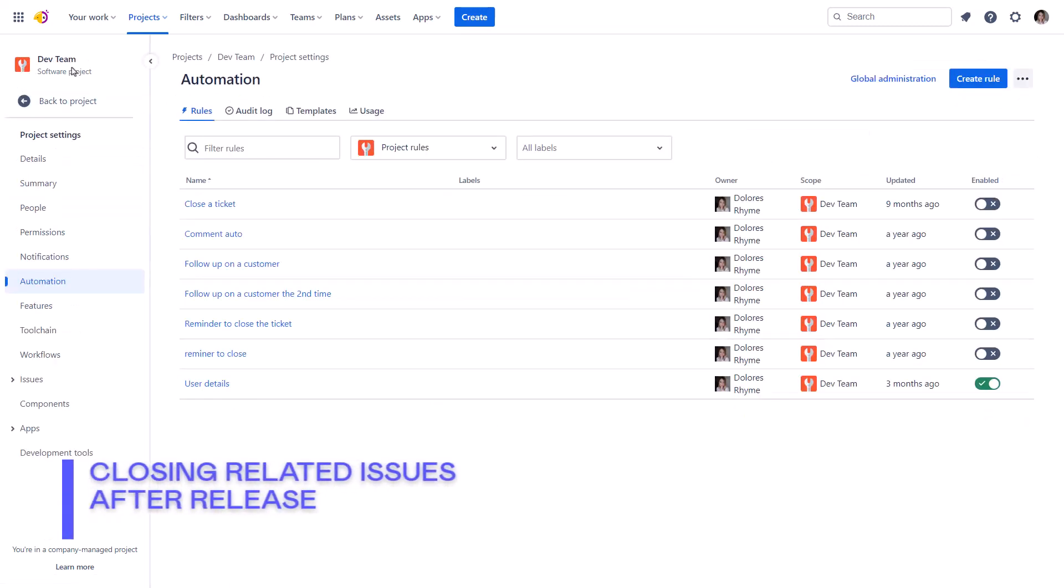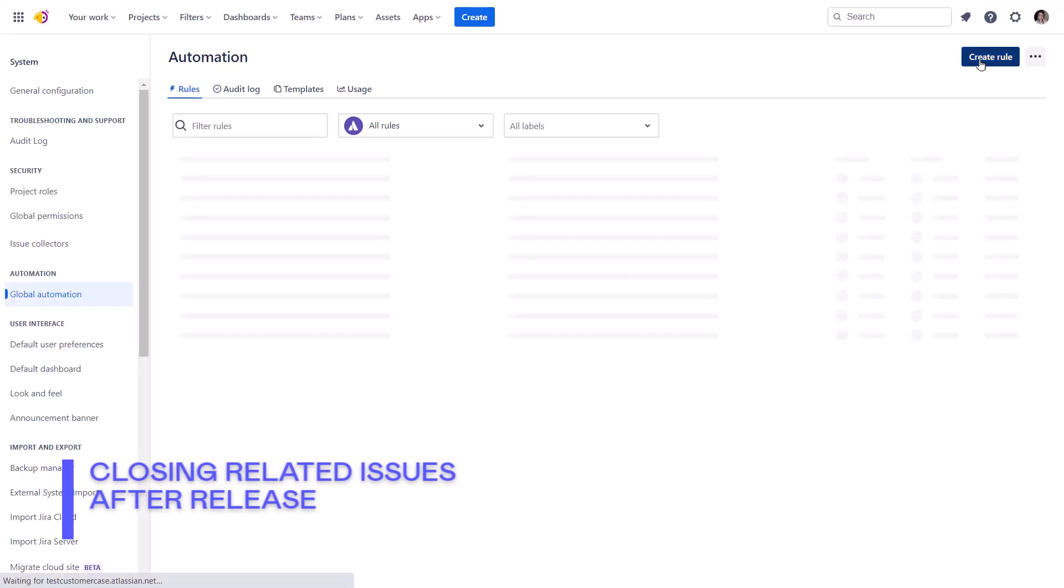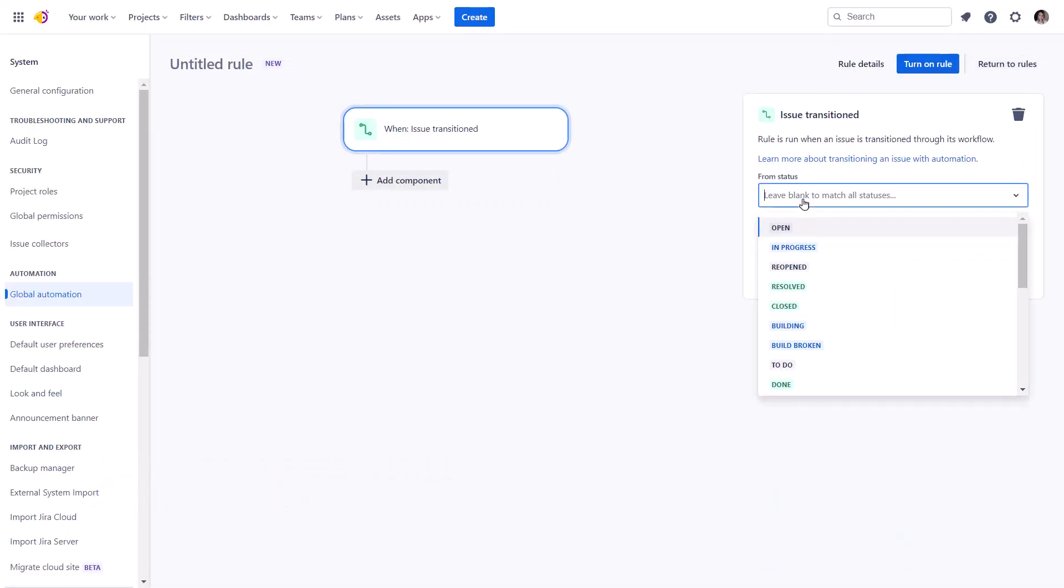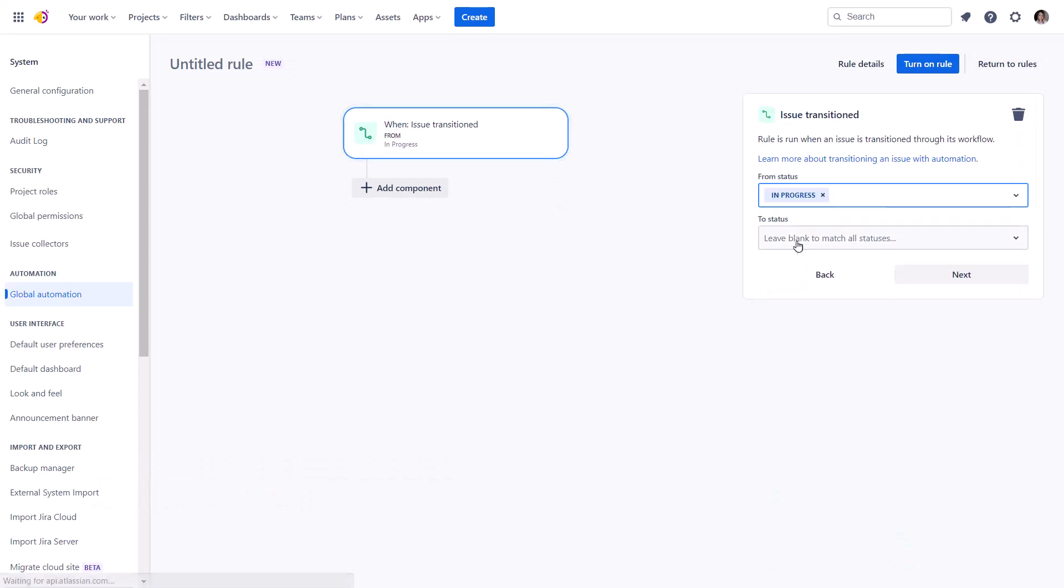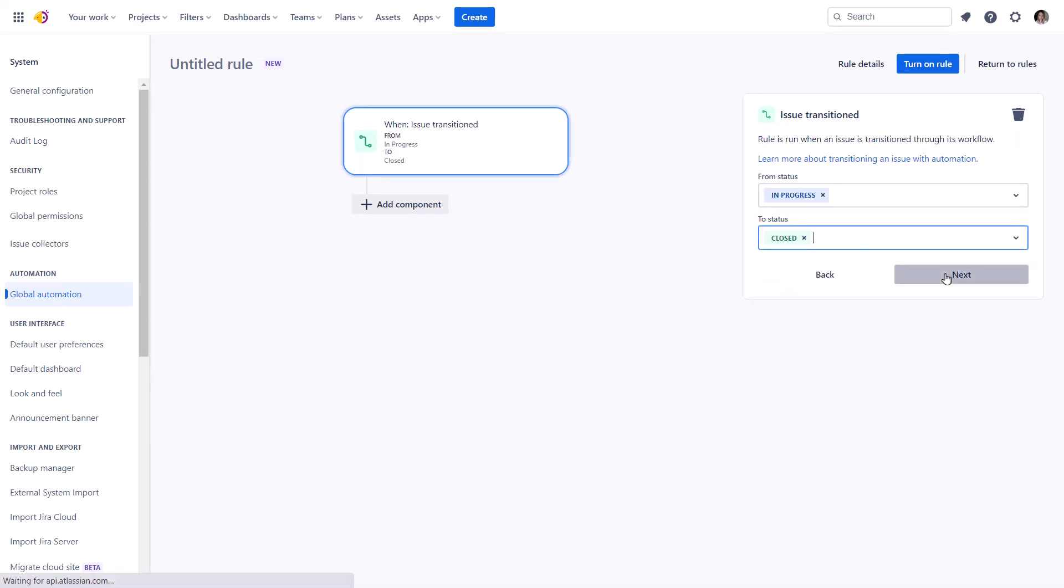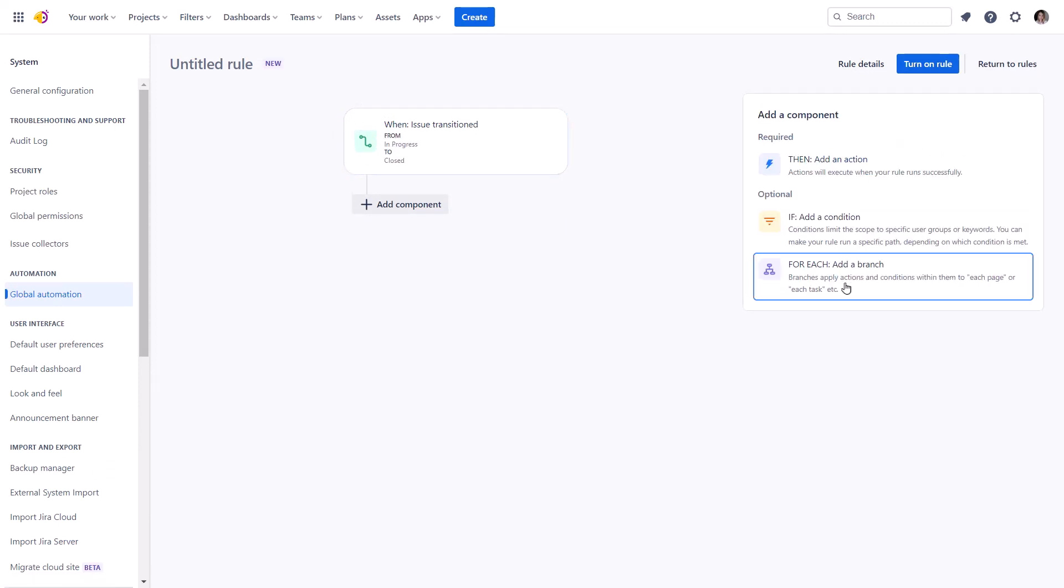The next rule eliminates you from the tedious process of closing linked issues manually after the feature release. Since the related issues can be in other projects, we must also set it up globally.